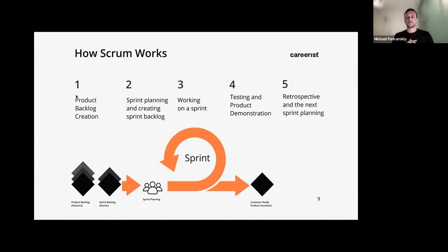That's a Kanban system, right? That's what Kanban is. It's just feature. If the ticket's moving down the column from backlog to do, to code review, or whatever it may be, to ready for QA, to QA, or maybe to done. And it could be like 4 or 5 of those columns, maybe more, depending on how your team is organized at the company that you're going to be working at.